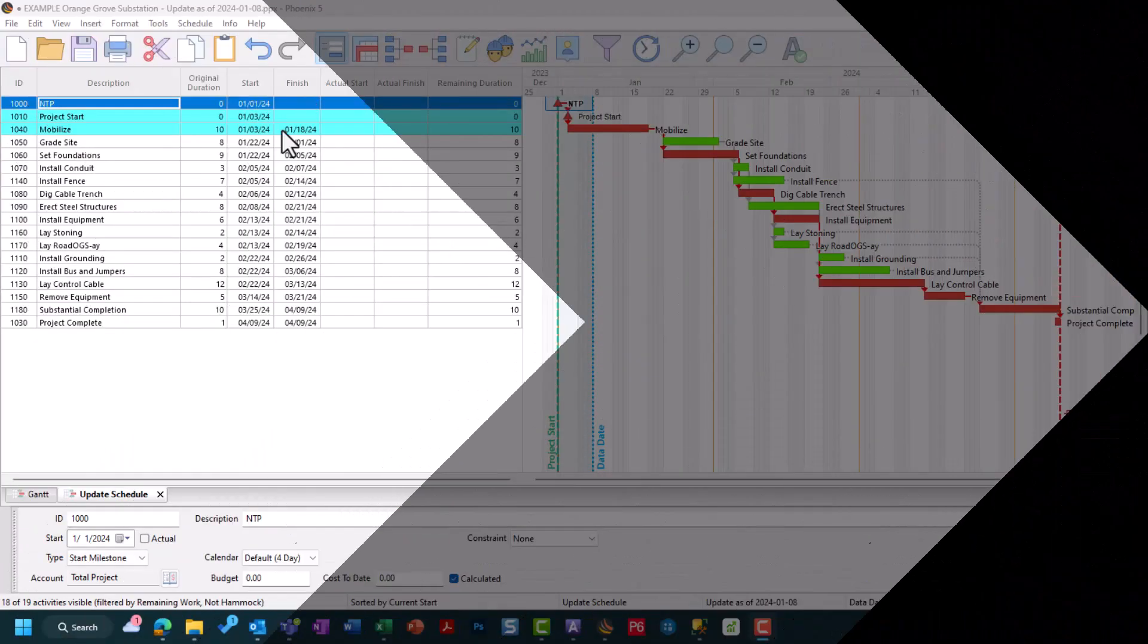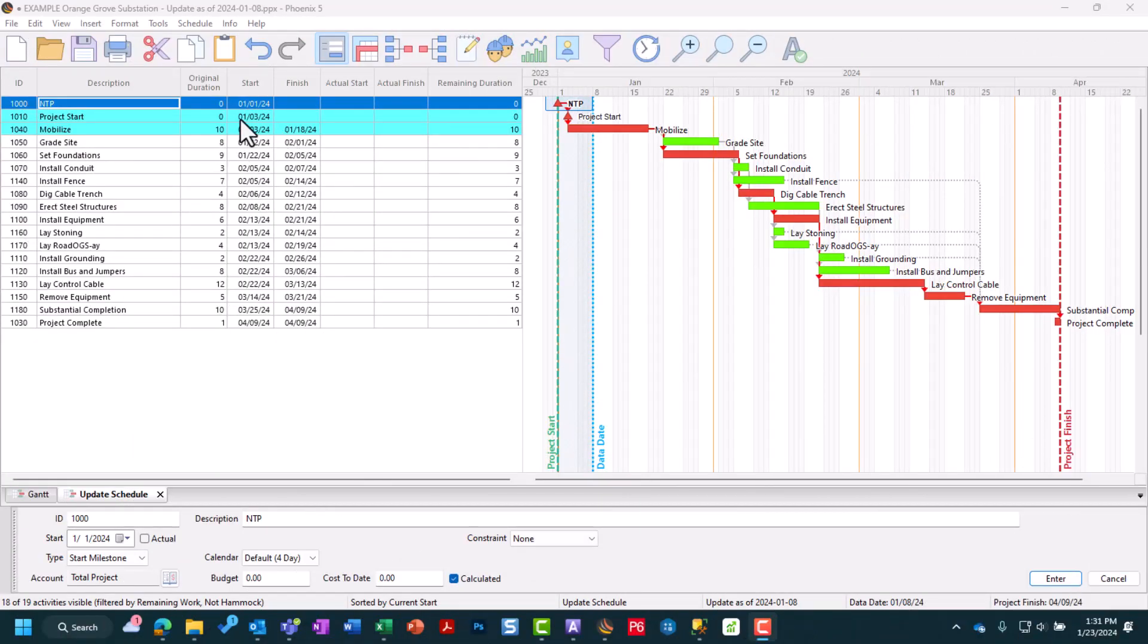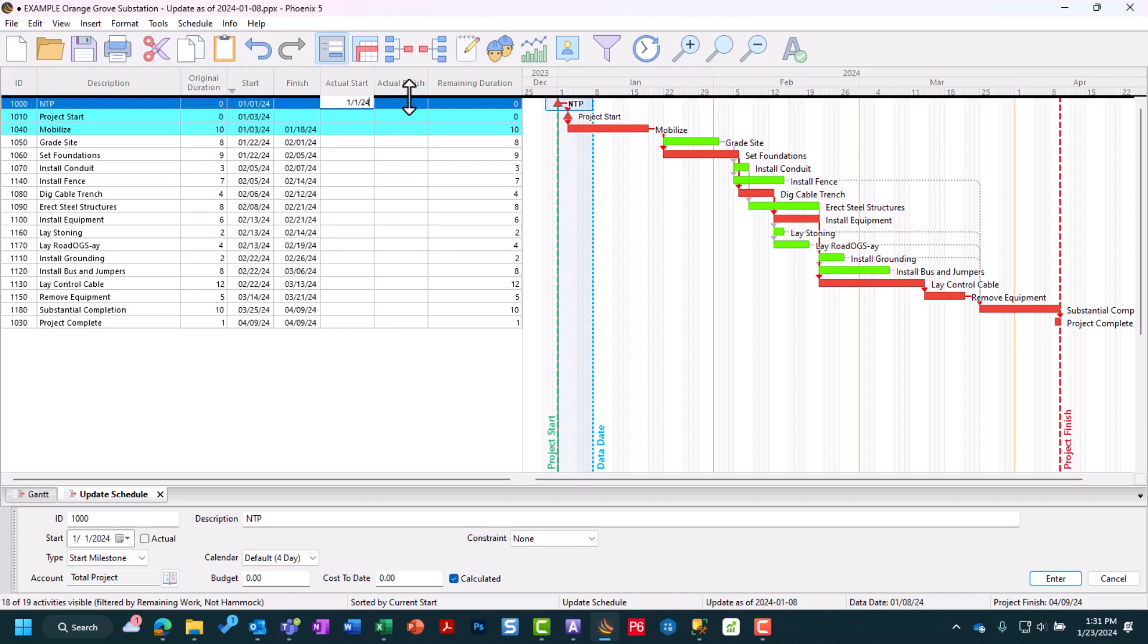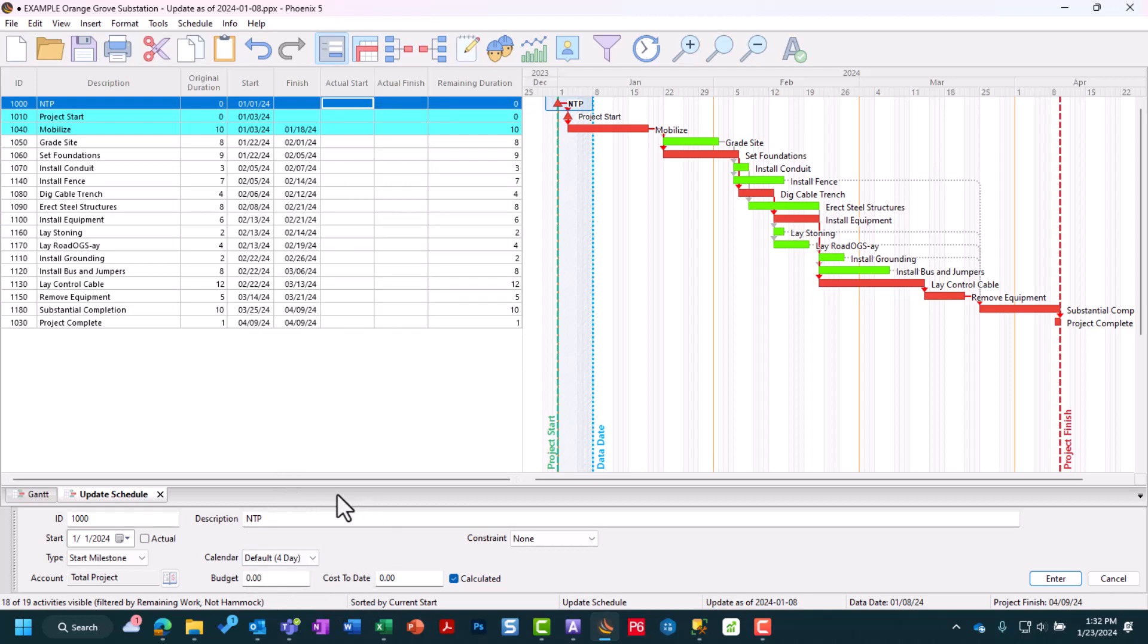When doing the actual update, you can plug in values directly into your columns. For instance, I could plug in the actual start for Notice to Proceed. But keep in mind you'll have to be perfectly accurate matching the format of these dates. I can't just put in 1-1-24, it won't let me. It'll blank it out. For this reason, I prefer to use the detail editor at the bottom, the activity editor. It gives me much better control when updating activities.